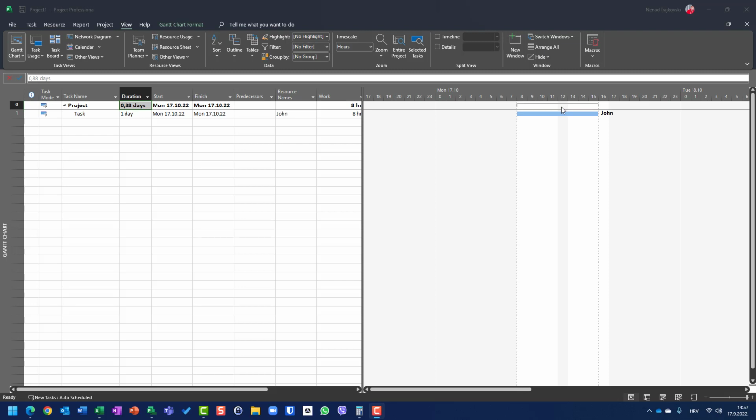So let me be clear. One day is 8 hours. Okay, here it is. But one day is also from 8 to 5, and John didn't work from 8 to 5. He used 7 hours of the 8-hour slot. Why? Because the slot is from 8 to 12 noon and from 1 to 5. But he works, because he's on the 24 hours calendar, from 8 to 12 noon, then at noon, from noon to 1, and then from 1 to 4.